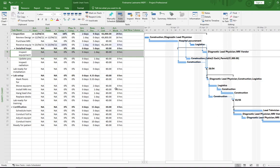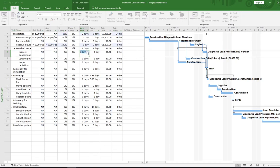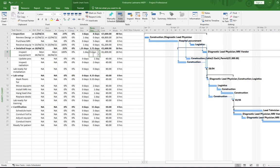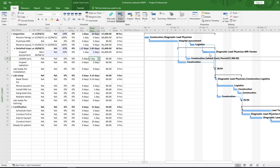We'll update Task 6 next — that's Inspect Equipment. Click into the task; the actual duration is one day, so type it in and press Enter. Project calculates the remaining duration as zero. But what if something happened and we still have two days left? Click in the days remaining field, type two days remaining, hit Enter, and you'll see Project actually updates the Gantt chart to account for those remaining days.